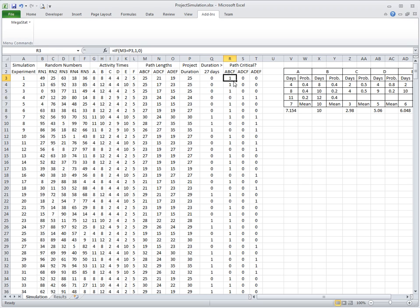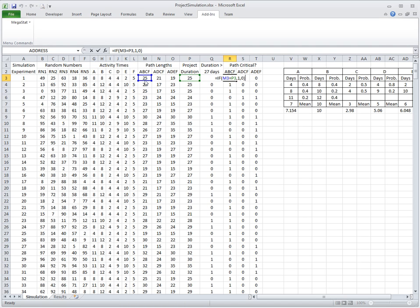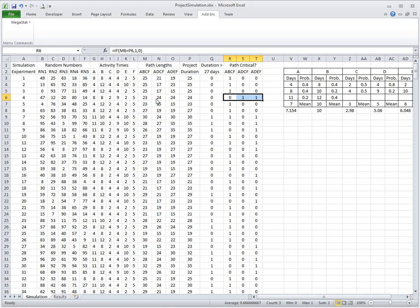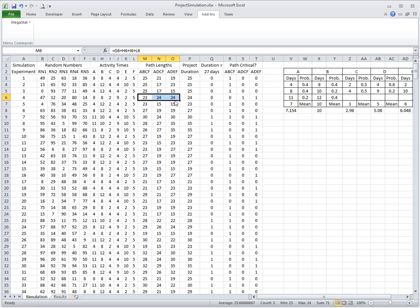Here we have an indicator which says 1 if a path is critical, or 0 if not. This is computed with an IF function that compares the duration of the path to the project duration. So if it is equal, it is a critical path. Notice that sometimes we have more than one path that is critical because path lengths might be identical.